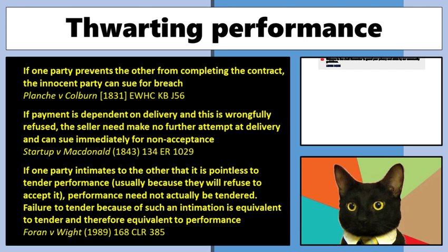They can be dollar-wise, and again, this is one of those points I'm going to say now, but I'll reiterate it later. The amount that you can become liable for is often not what you think it is. I've explained this rule to a lot of lay people over the years, and they go, that can't be right. And I go, yeah, it is. The purpose of damages in contract law is to put the innocent side in the position they would have been in if you didn't breach.